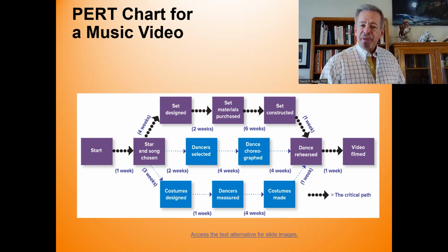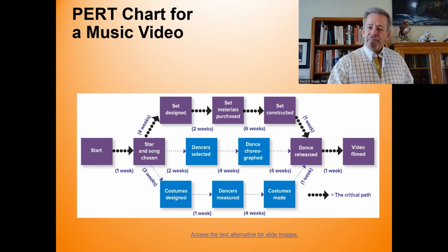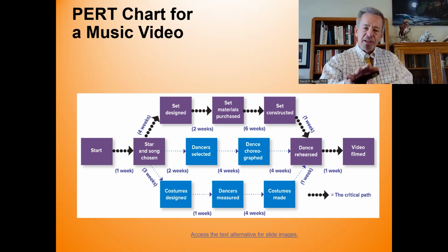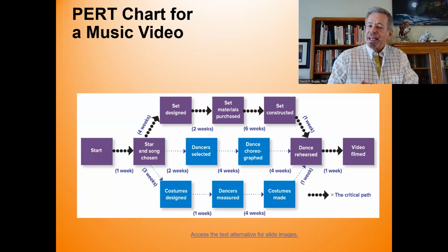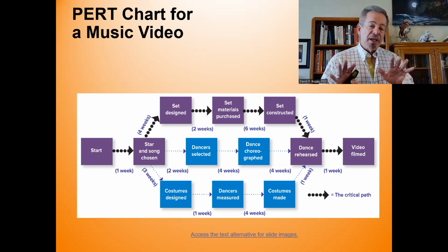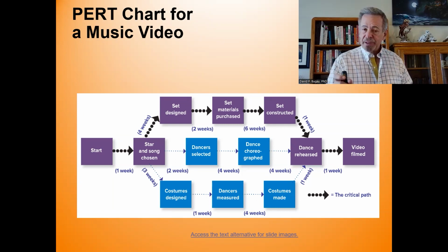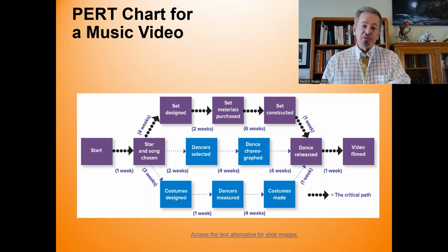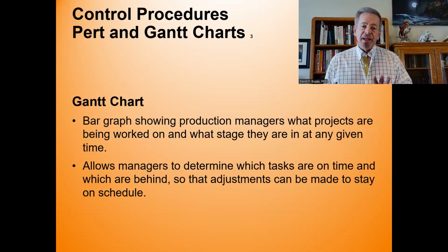The set design, materials purchased, constructed. In the meantime, while those things are happening, you can be doing the things in the light blue on the bottom and have them going at the same time. But you have to focus on the critical path because they all have to follow one another in sequence, and there's a timeline there. So you can add more tasks without lengthening it unless you touch that critical path.